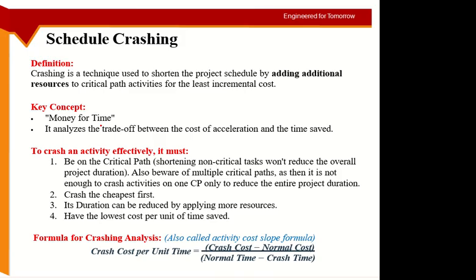And the last one is related to the second one, but now they are saying you don't look at the total extra cost, you have to look at per unit extra cost, okay, per day extra cost. So you get the idea from the example I gave you. I told you 50 per day and 30 per day. So I'm looking at per day extra cost or per unit time extra cost. Okay, so there are 3 main points here. 4 are mentioned, but 2 of them are interrelated.